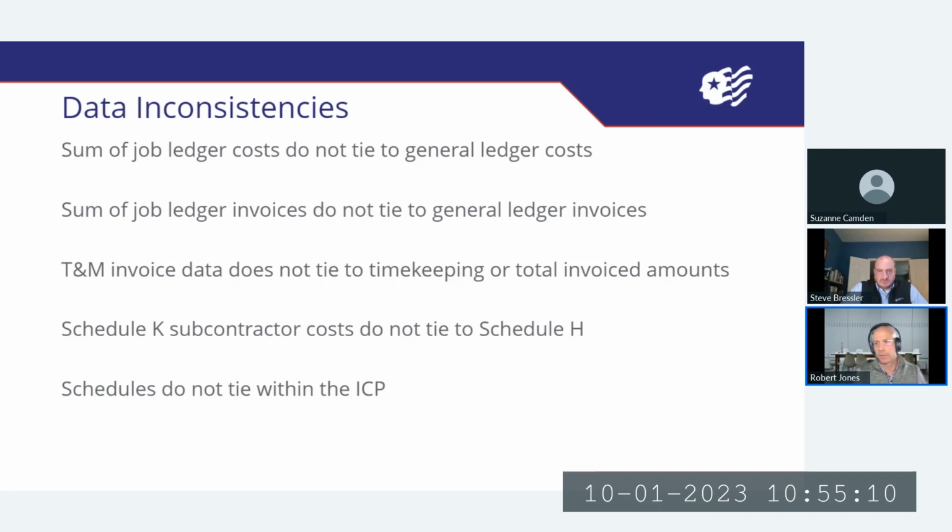Subcontractor costs not being appropriately assigned. That's one that we see sometimes, is that clients will get the subcontractor's bill and pay it. They code it to subcontractor direct costs, but they don't associate a project with it. Or maybe they get an invoice where the subcontractor is working on multiple jobs and they don't break it out properly, right? And so now all of a sudden we have some inconsistencies and we don't have the appropriate level of detail that's necessary to report in the incurred cost proposal.